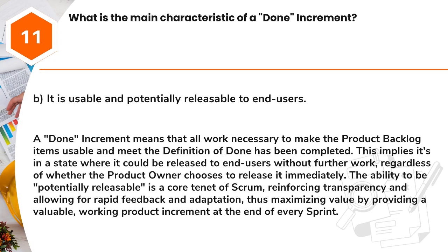Answer: B. It is usable and potentially releasable to end users. A done increment means that all work necessary to make the product backlog items usable and meet the definition of done has been completed. This implies it's in a state where it could be released to end users without further work, regardless of whether the product owner chooses to release it immediately.